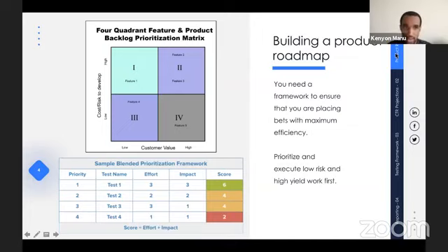By the time you make these estimates and then you haven't had your engineers or your engineering leads' input, you'll find that you probably under or overestimated cost and risk to develop. So it's really key and critical that you get their input on this before you go into this process, or at least before you finalize it. So what you're going to see here is that you have cost risk starting from low and going to high. Same thing with customer value.